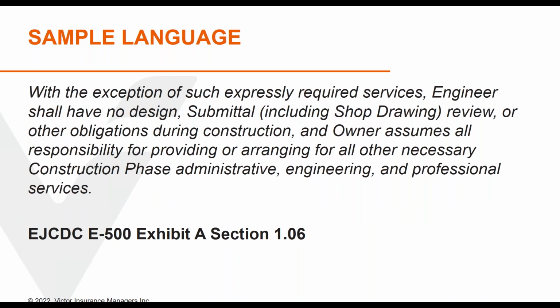Now, if that's the case, the place to go to, as always, if you can find it, is in the standard form agreements, and the EJCDC E500 has that type of language where it assumes that you have no construction phase responsibilities.